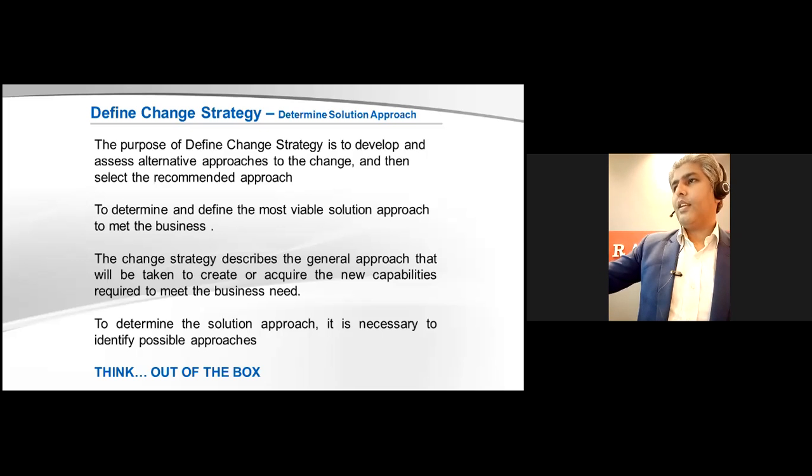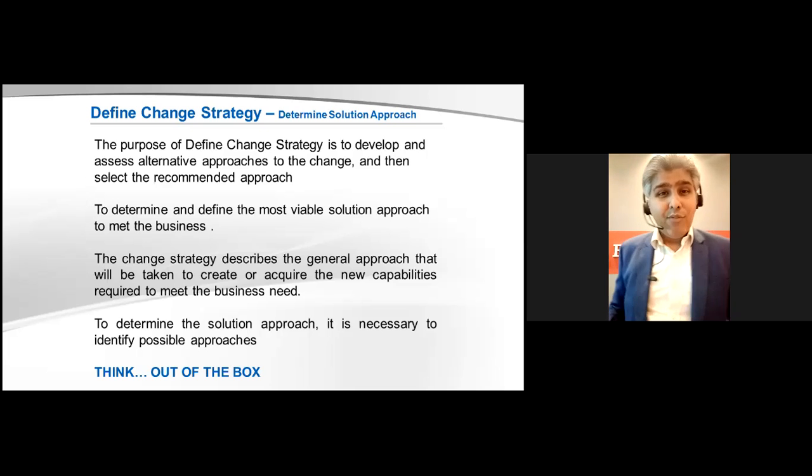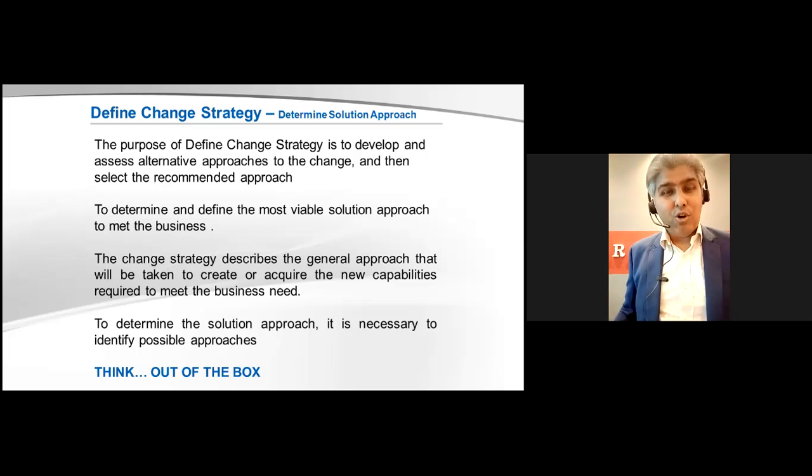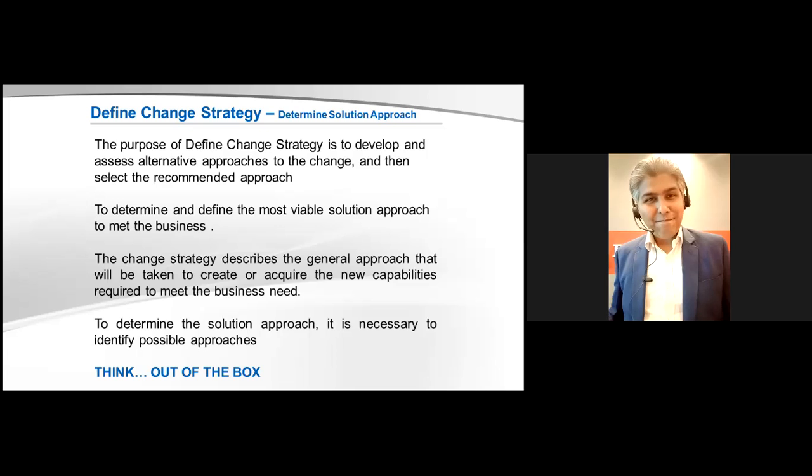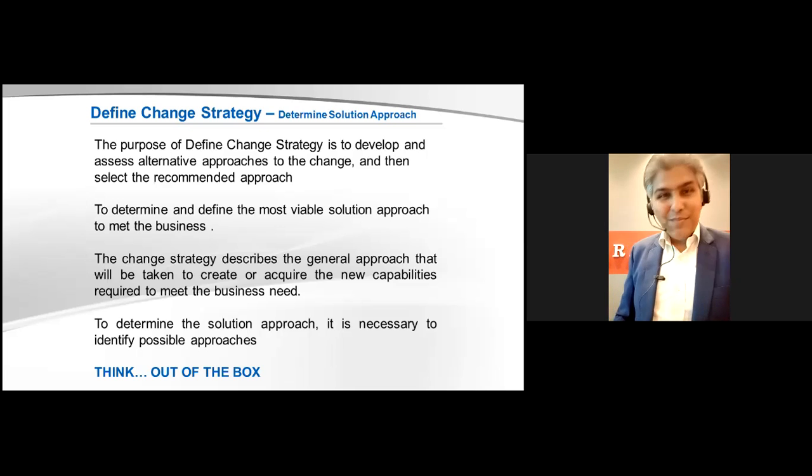Slow approval. Okay, plan for it. If you know that the process will be slow, identify multiple signatory authorities. And define your RACI. This is the best way of solving this issue, the signature approval process. Define RACI, and rather than putting one person, put 2 people there. Okay, it will make it faster.